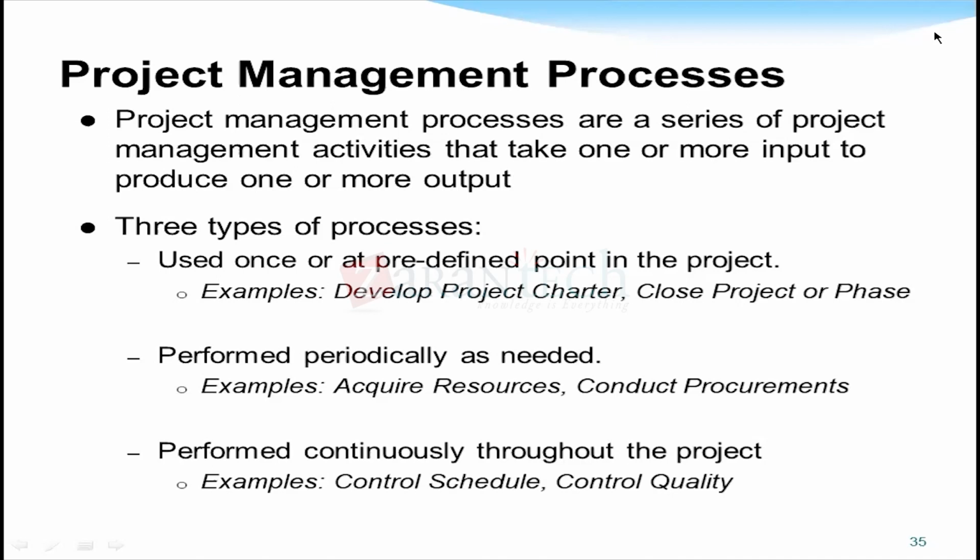And again, performed periodically as needed. For example, you are recruiting resources for the project, therefore you're adding resources. In the starting of the project there are very few people. As the project goes on, you are adding resources additionally. Therefore, you have to keep on updating your resource plan. Therefore, it is performed periodically as needed, like acquiring resources or acquiring licenses for the software.